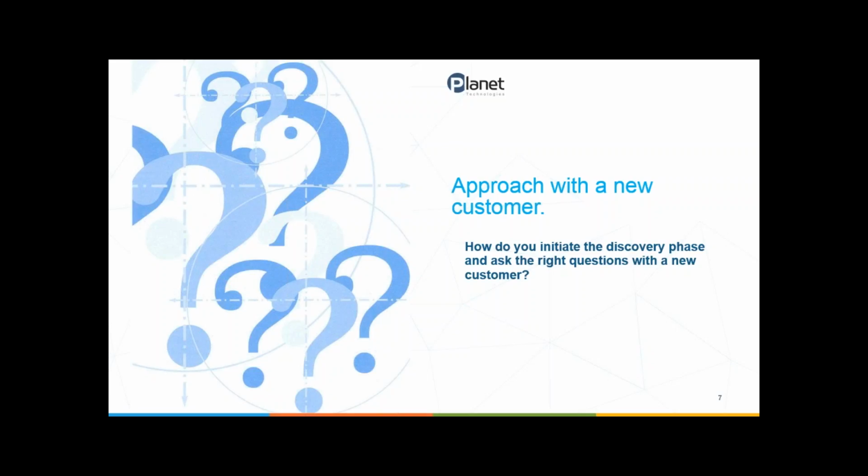So typically our biggest concerns out there are with any legacy applications that have been deployed in the environment. A lot of them are built in-house, and they may not have current code. So we have to worry most about application compatibility.